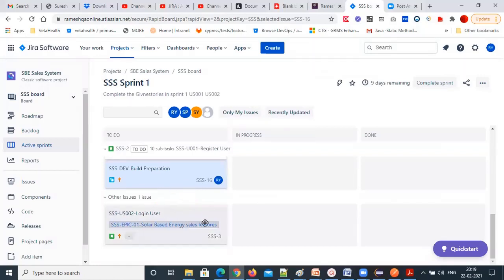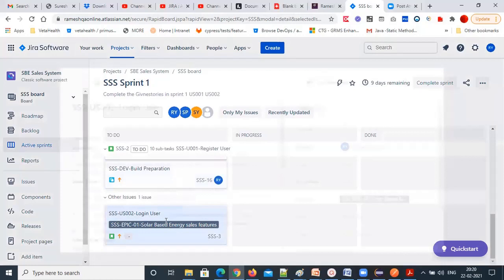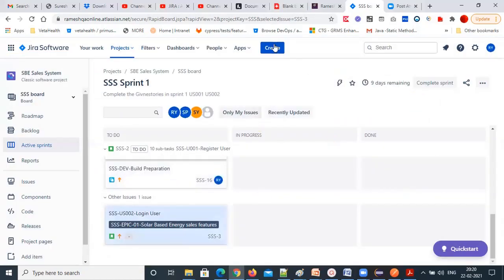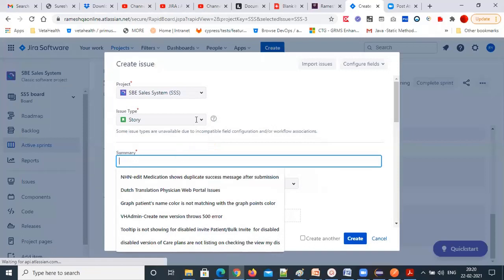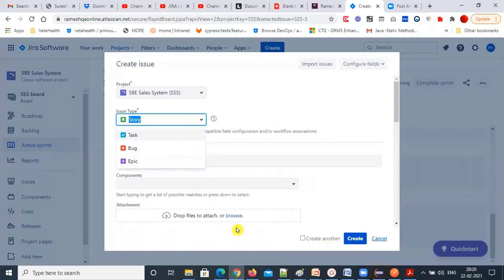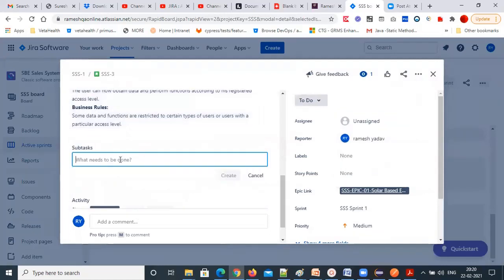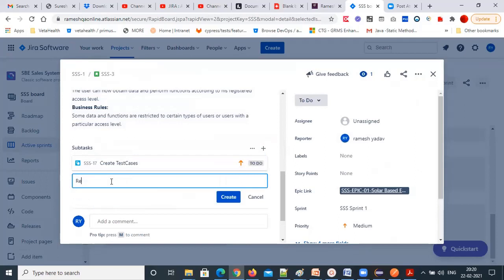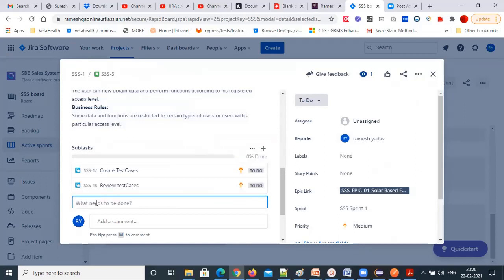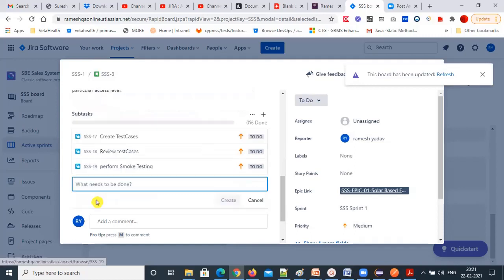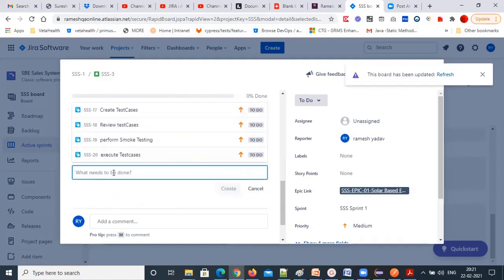The same way, you create tasks for the second user story. You can open that user story and create subtasks — 'create a test case,' 'review test cases,' 'perform smoke testing,' 'execute test cases,' and after executing, 'defect reporting.'